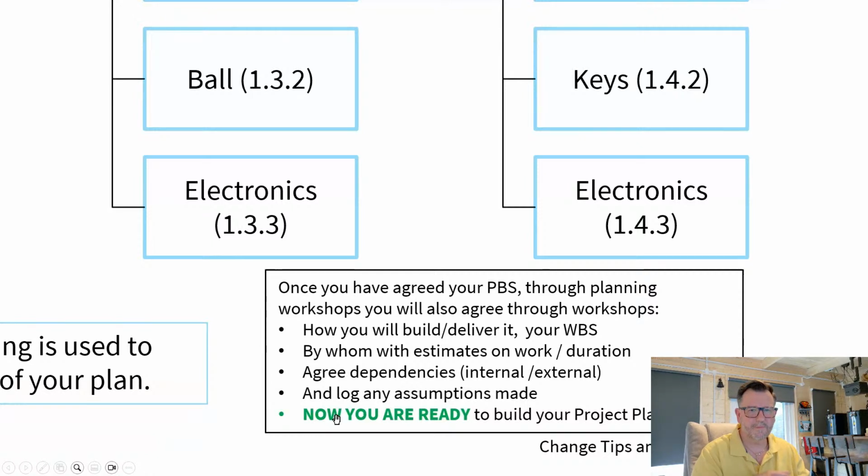You'll also have a number of assumptions, and these are fundamentally project management speak for guesses. And I've always been surprised when we have assumption logs that seem to have a very long lifespan. They should only really exist within your initiation document and through your initiation phase, but going forwards, they then should be managed as risks if you cannot validate them, and then you manage them through your risk management framework. But once you have all this, you're now ready to build your project plan.